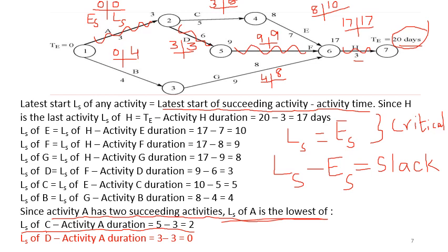So this is the evaluation or the estimation of critical path in CPM networks. You can see here both the methods, the ES and LS method, this particular method which we have solved now, and also the different paths, maximum path method. Both have given the same critical path with the same total expected time of 20 days. But this method is more practical in nature.